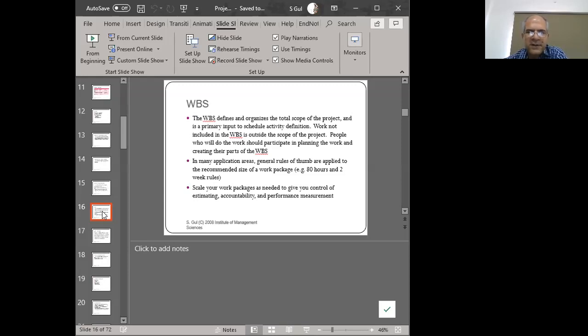So if you have a heuristic of that nature, you use that. For example, foundation digging takes a minimum of 6 days. So if you've got a heuristic like that, you shouldn't schedule your digging of the foundation to be in less than 6 days. You've got some sort of a learning or some sort of a ground reality that's present with you.